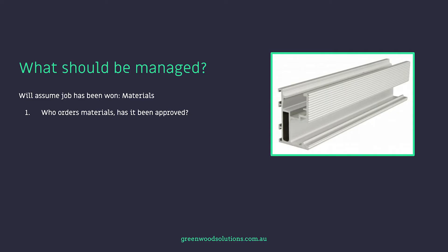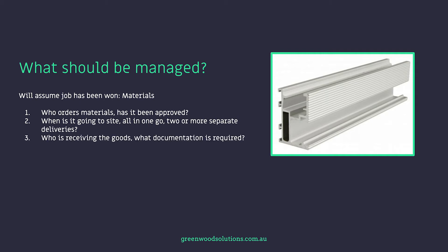Consider materials: who ordered the goods, has it been approved, how are the goods coming to site — is it one delivery or two? Who is documenting the process? Who's taking photos if materials are damaged? Any task you can think of, you can break down to who's involved, for how long, what's involved, who's been consulted, who's been informed, and who is ultimately responsible for that task.